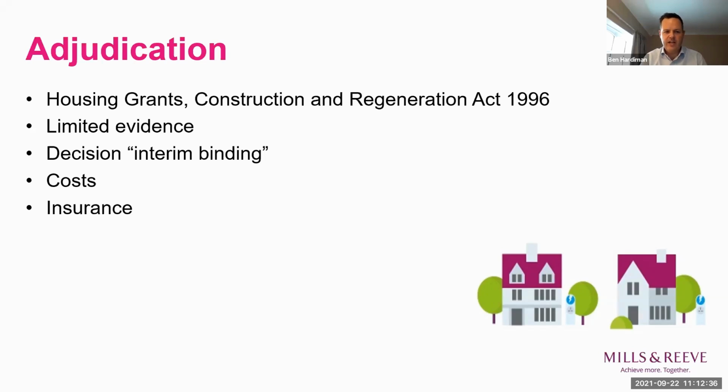Now, the Act defines a construction contract fairly broadly. It includes services ranging from architecture to design and surveying work, through to the building and engineering aspects of a project. And since, subject to the usual limitation rules that Andrew referred back to, a referring party can serve their notice of an intention to adjudicate at any time, and that wording has been found to mean that a dispute can be referred after practical completion.